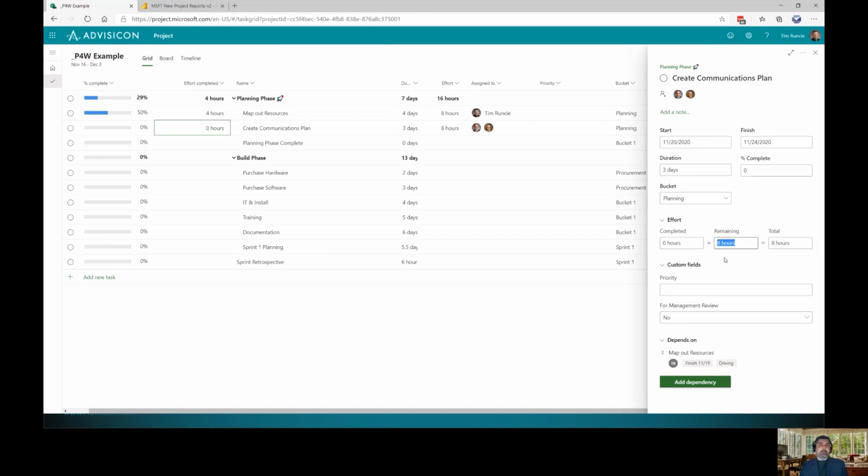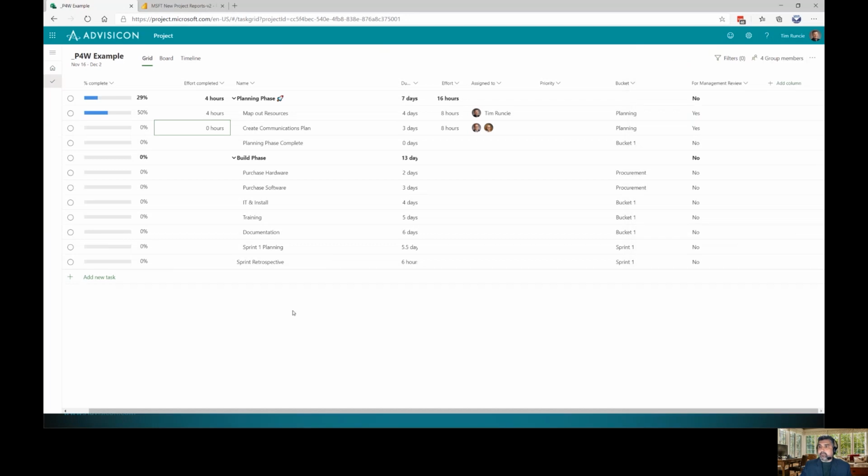A lot of organizations, I just tell people, "Hey, look, we estimated, we put in an effort. Now what I want you to do is always tell me how much is left to do, right? We started with a single number. We'll continue to move from there. But I always want you to let me know what's done or what's not done." And if it needs to be reviewed by management, we can quickly flag those and have them in our views.